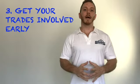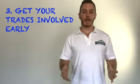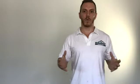Point number 3 is get your trades involved early. Estimation is difficult at the best of times, but when you've just started, it's going to be very hard because you're not really going to have any idea what prices are or what you're talking about, to be honest. So get trades involved early. Get advice, get quotes during your due diligence. If the figures blow out, you can just walk away. We've had a couple of projects where I wish we did that because figures did blow out, and in one case we actually didn't end up making any money out of the project.